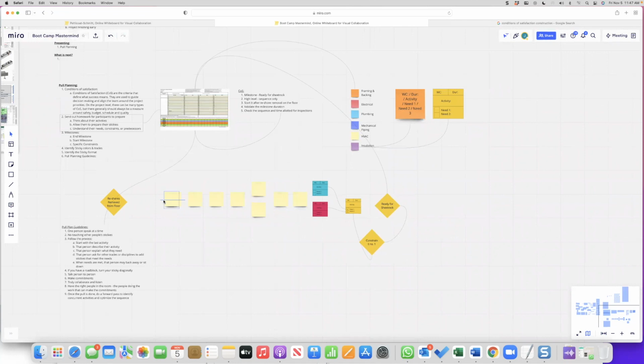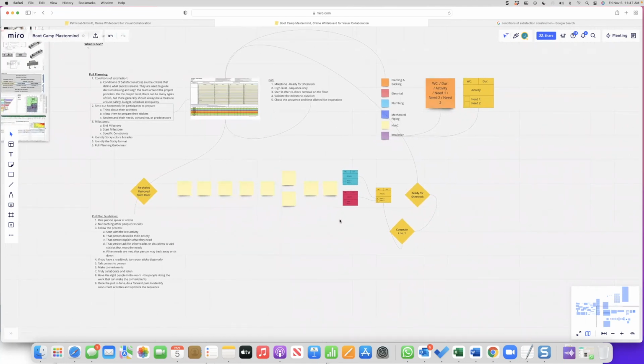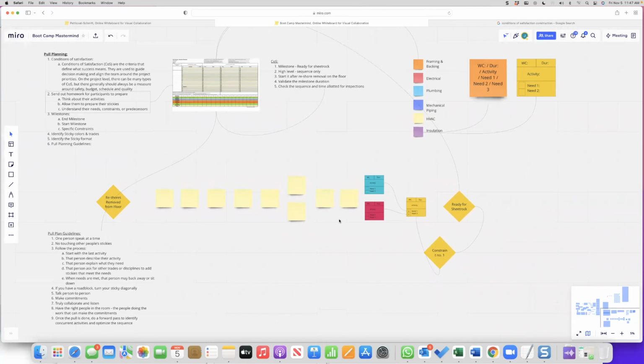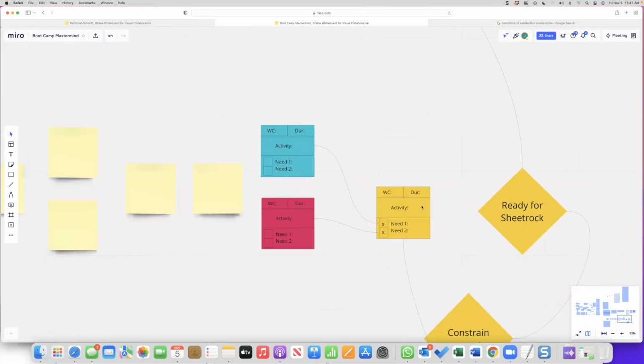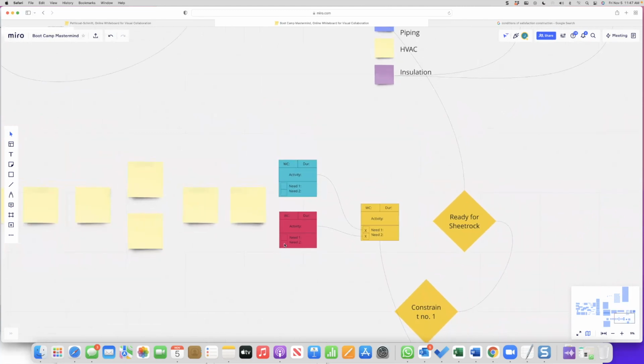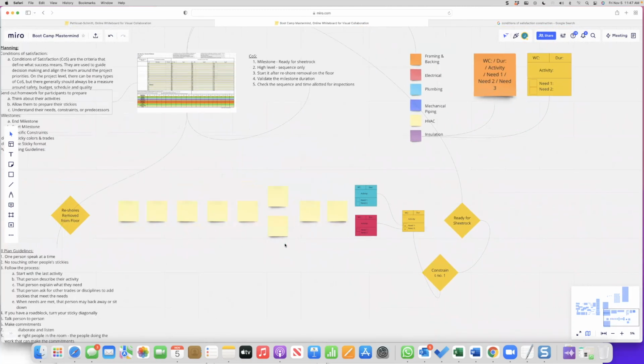So they go back and they do their sequence. And then once they've done it and you've exhausted your sequence, and real quick, let me quiz everybody. How do you know you've exhausted the sequence? Nobody has any stickies. When nobody has any stickies and these little boxes here are checked, which means that everybody's needs have been met, right? If you have a box that's unchecked, that means the sticky hasn't been put up on the board yet that you need.